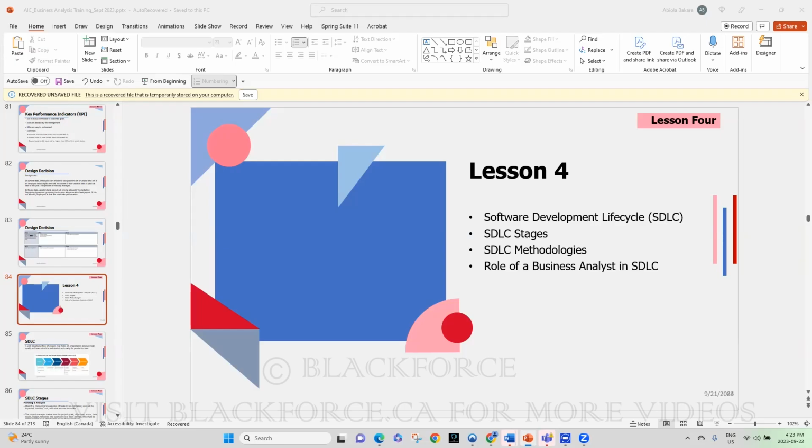We selected stories into this sprint. We started the sprint, but one of the developers realized that even for the story I selected, if I don't build the one I left in the product backlog, I can't build this one. Let's say we selected a total of 2 stories, and we have 2 developers. Developer 1 will develop one, developer 2 will develop two. Then developer 2 realizes, "This story they gave me, I cannot even build it." Well, you're not going to have them just sit down for 2 weeks and not do anything, right? So in exceptional situations like that, changes may be made. Return the story and pick the new one.